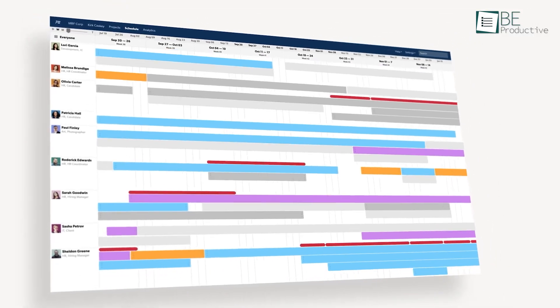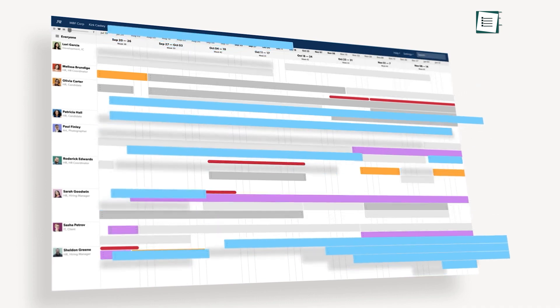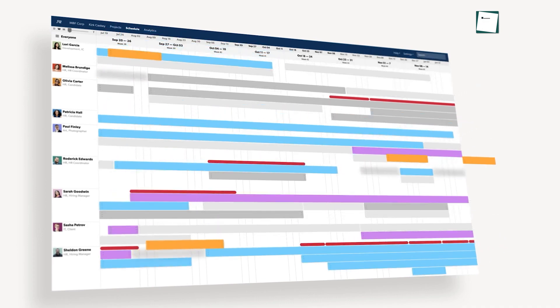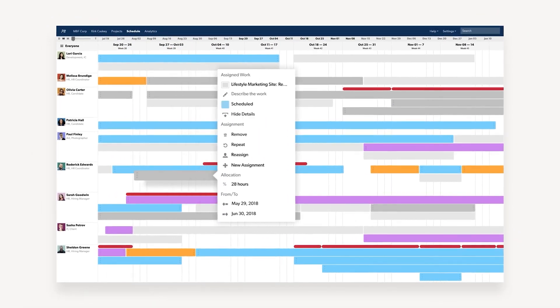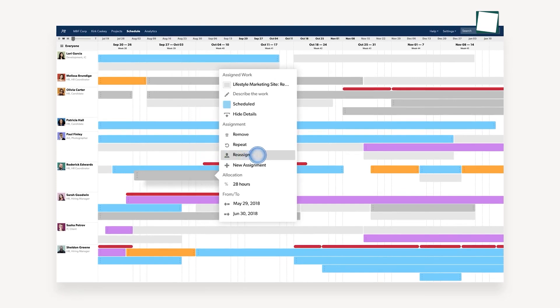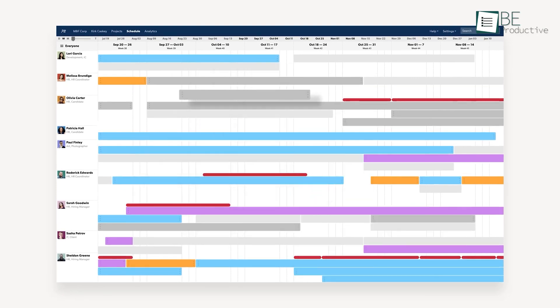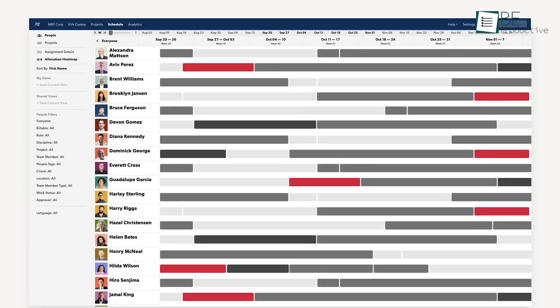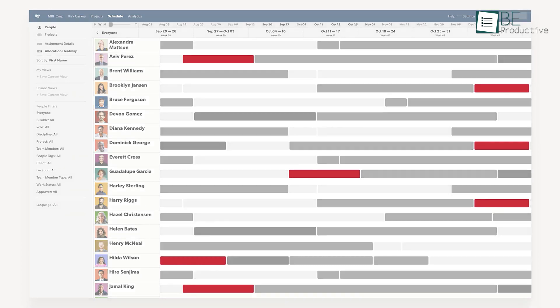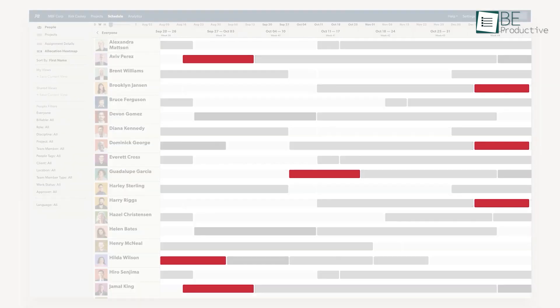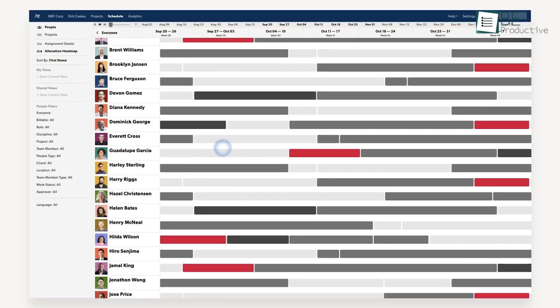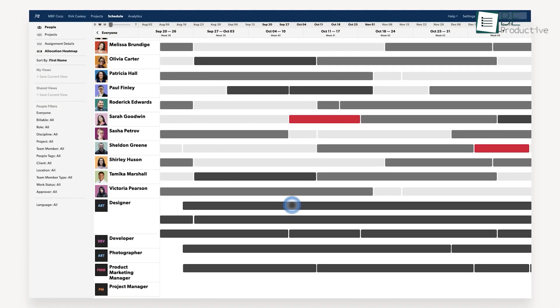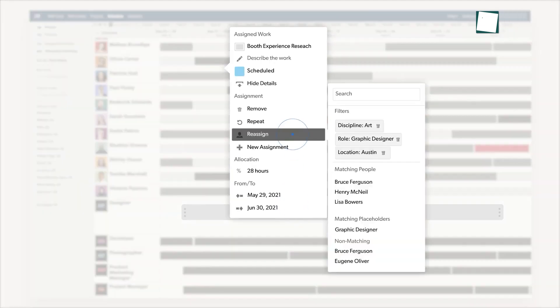Smartsheet's allocation heatmap really impressed us. This view gives a color-coded overview of resource allocation across our team. We found it useful for quickly identifying who's overloaded and who has extra capacity. For instance, when we were planning a new product launch, we could quickly see that our design team was at capacity, while our content team had some bandwidth. This allowed us to adjust our timelines and resources accordingly.